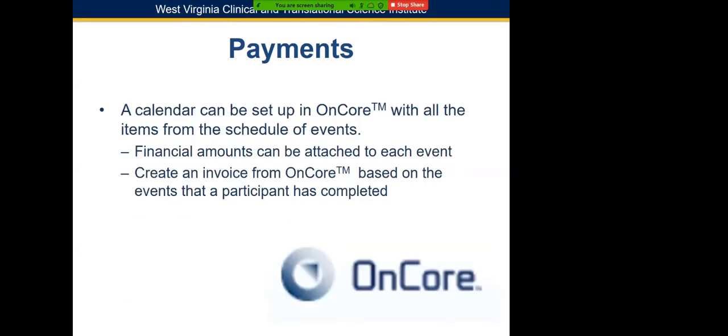A calendar can be set up in Encore. It would include all the items from the schedule of events. Financial amounts can then be attached to each event, and that way, whenever it is documented in Encore by the study coordinator that a visit has been completed or a task, you can automatically create an invoice in Encore based on the events so that you know what to bill the sponsor.